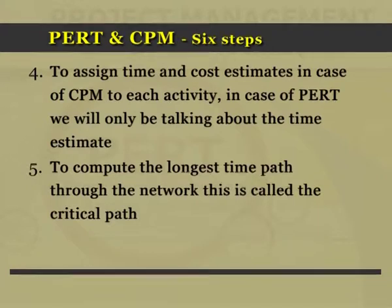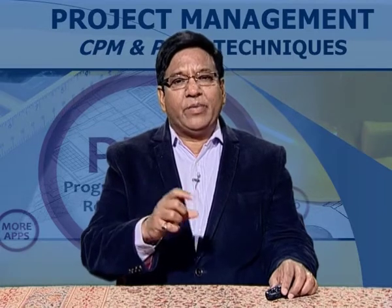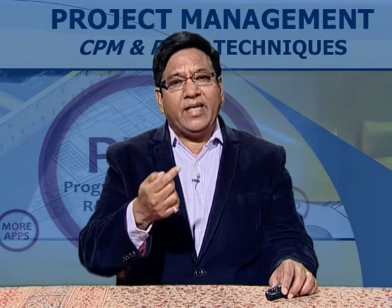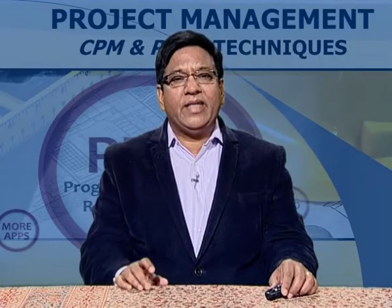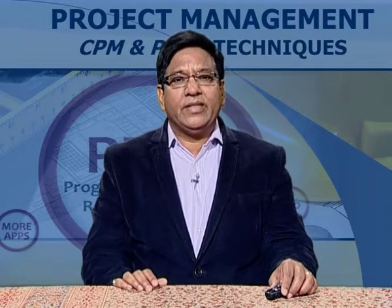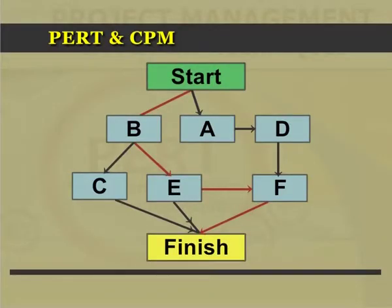Activities are identified, time estimates are given, precedence relationships are established, the network is drawn, and the path with the longest time is chosen as the critical path. Step six: use the network to help plan, schedule, monitor, and control the project. The critical path is very important since any delay in these activities can delay the completion of the entire project.